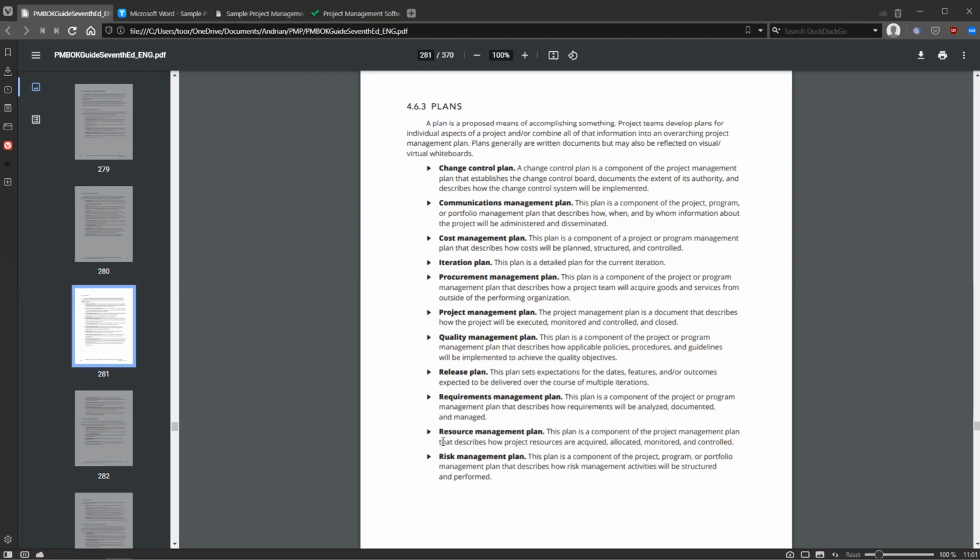Basically, to have agreement, as you mentioned, if there is expectation of executive sponsor to have project done by early December, and in the end we estimate that it's not possible to have project completed before end of December, then this needs to go into change control plan that has to be confirmed by all the stakeholders, including sponsor, that yes, they agree.